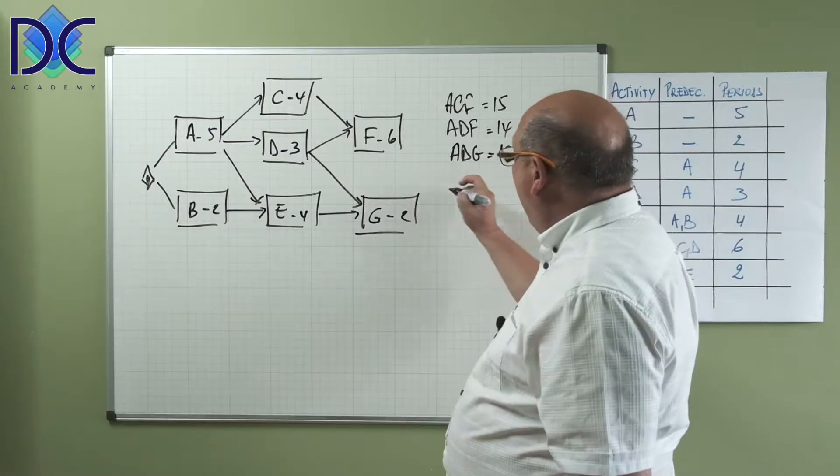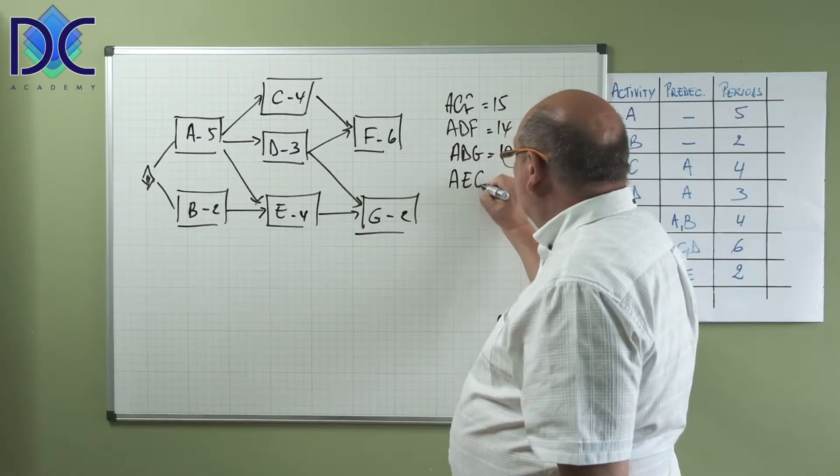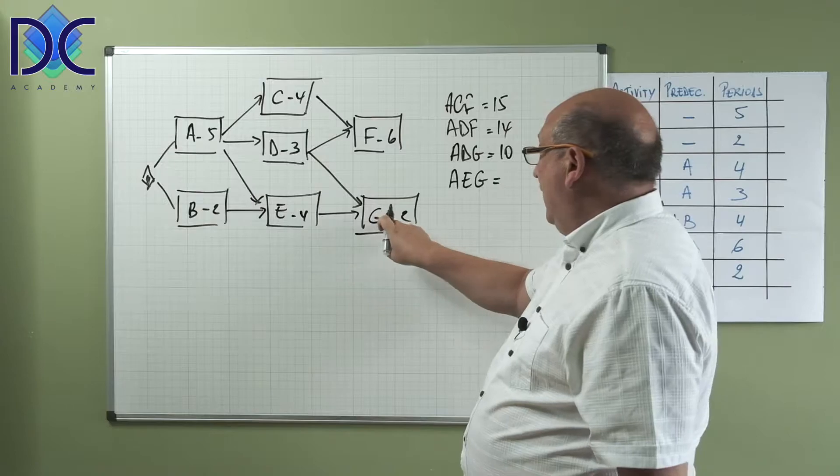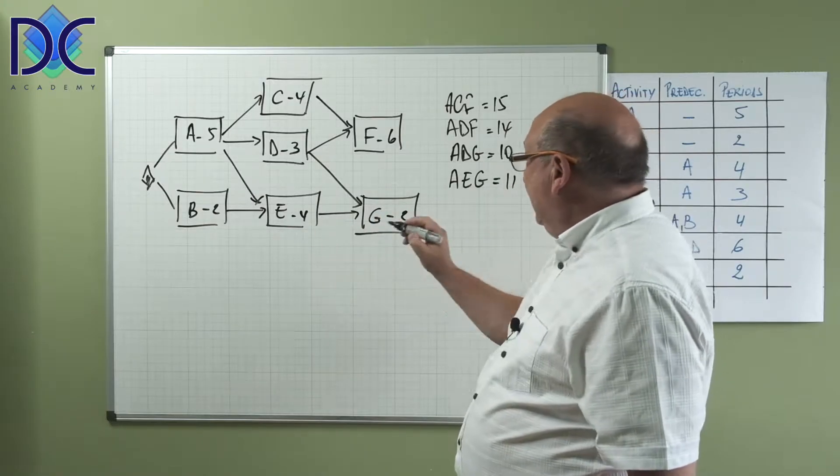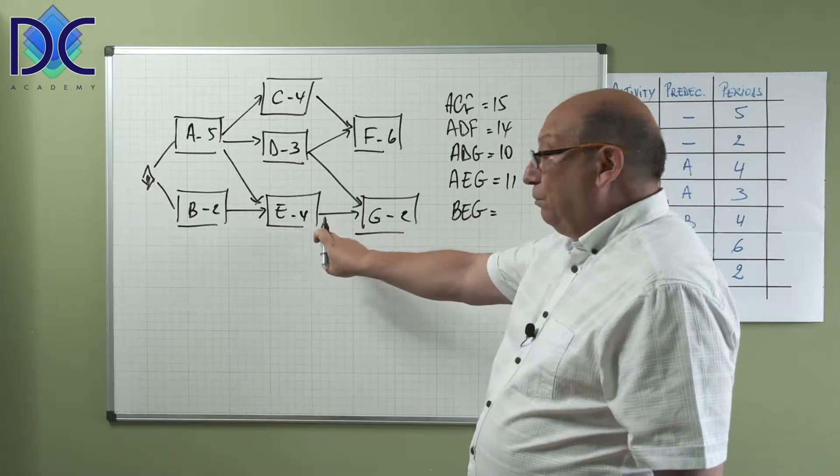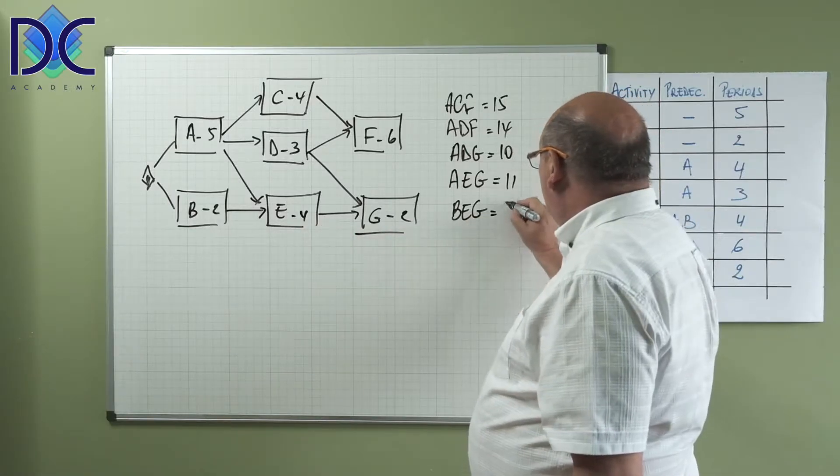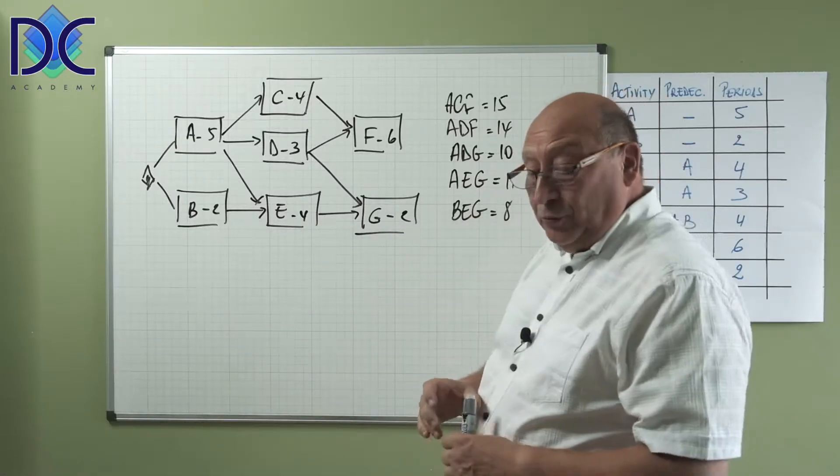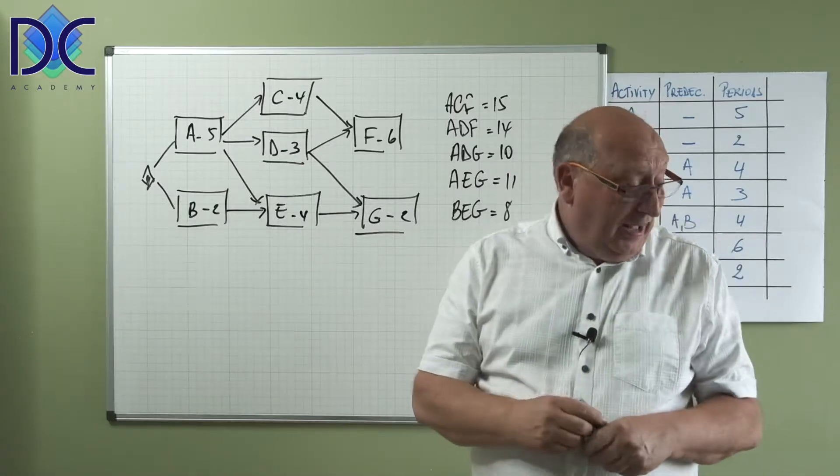Then we have AEG, 5 plus 4 is 9 plus 2 is 11, and then we have BEG which is 2 plus 4 plus 2 is 8. You see that we have now more paths through the network.